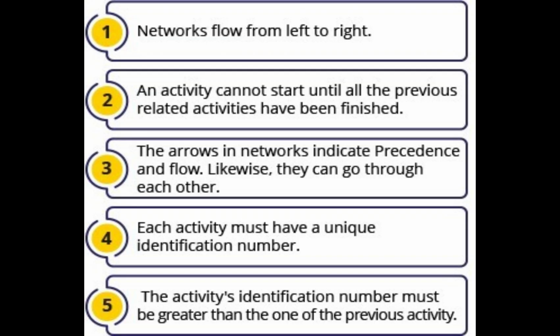A route is a sequence of interconnected and dependent activities, while a critical path refers to the routes of greater duration throughout the network. If an activity is delayed in the path, the project is delayed the same amount of time. Steps to make a network diagram.